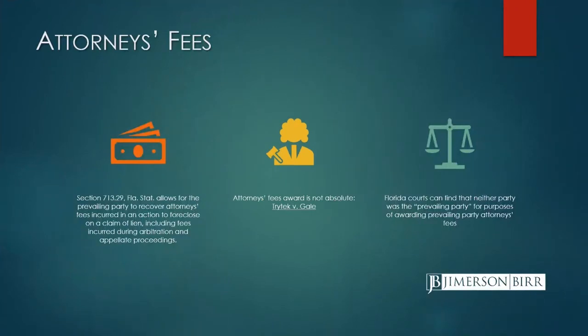Attorney's fees. It's a question that every client and lawyer should look at in determining whether or not a lawsuit is something worth pursuing. The statute applicable here as it relates to lien claims is 713.29. Under Florida law, you can only get your attorney's fees by contract or by statute. There are some other procedural ways in which you can implicate attorney's fees, but start with the premise that you only get your attorney's fees if there is a statute or a contract that authorizes it. In this case, if you're proceeding under a lien foreclosure lawsuit, the lien law, Chapter 713, specifically 713.29, allows the prevailing party to recover its attorney's fees.